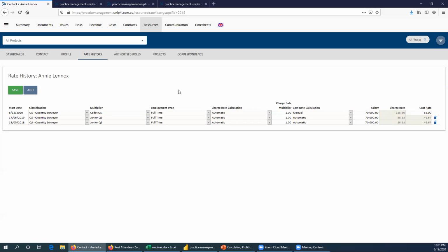If you get the automatic classification in Power BI, you can start to look at those underlying methods and look at, okay, we expected 1,800 hours, they booked 1,900, do 100 hours times that rate, and that gives you how much of a cost variance caused by standard rate variances, volume variances, sorry. And that sort of analysis can be done using the data captured in the system.